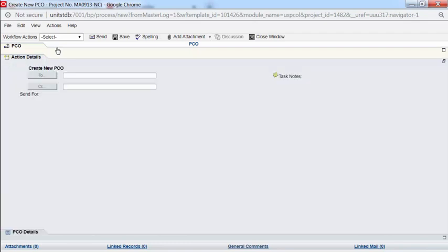Next, we're ready for our workflow action. Your options are to either set up an estimate or issue a pricing request. Because we're not going to send this out to our vendors to kick off the VCOR, we're going to say Set up Estimate. Now if you were to click Save, this would save the record under your drafts, but it would not project the information for you to track on the Job Cost Summary Report, the cost sheet, or the PCO log. So you'll want to make sure that you click Send.